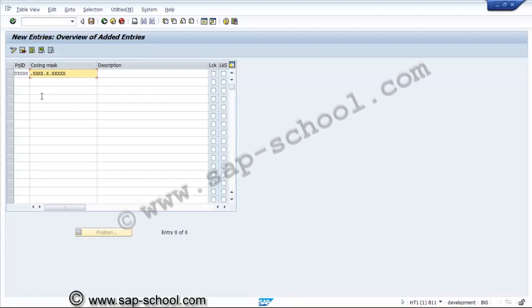Then if required, we can leave one more character for sublining. So we can redefine this. In the first level, the 4 characters we are using, first 2 for the fiscal year and next 2 for the serial number in that fiscal year.